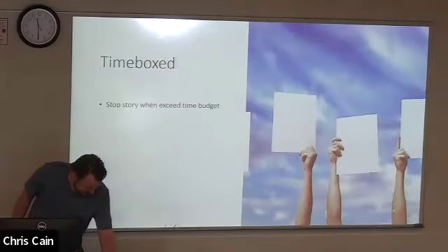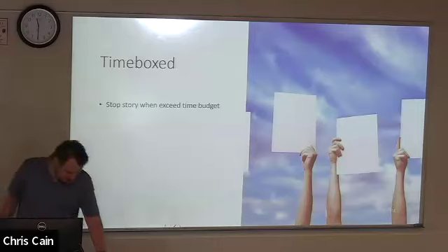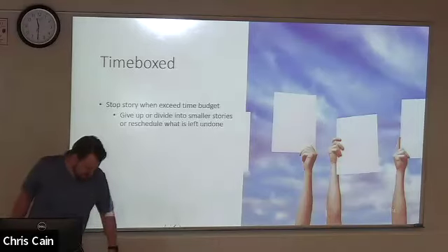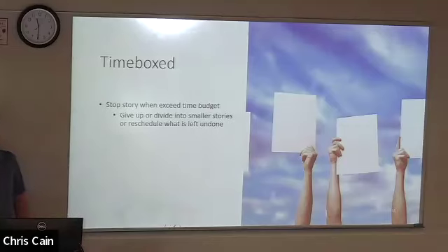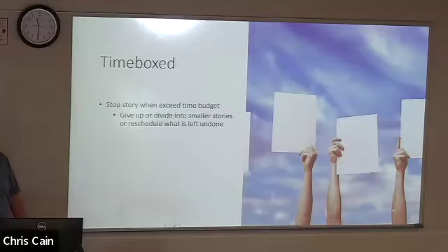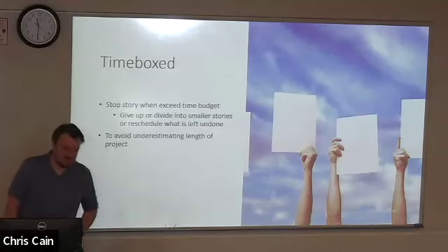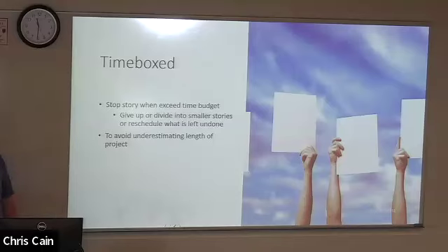Finally, we talked about time boxed. We have a particular time budget for all of these features. If you exceed it, then put it on hold. Scrap it or move it to the next sprint if it's really important. So give up, divide it into smaller stories, accomplish some of those stories, but not all of them. Reschedule what is left to be done to future sprints, or reconsider including it as part of the project. And this helps prevent you from underestimating the length of the project.